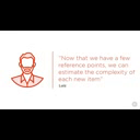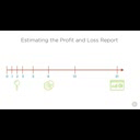Louise continues, now that we have a few reference points, we can estimate the complexity of each new item relative to the reference items. Everyone please take a moment to compare exporting the profit and loss report as a CSV to each of the reference items that I mentioned previously, and then to assign a complexity value to it accordingly. For example, if you feel that exporting the profit and loss report is about as complex as adding a pie chart to the business expenses report, then you should assign it an 8.